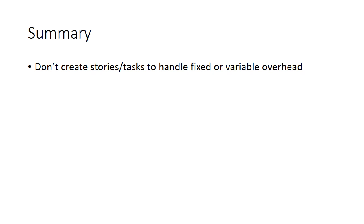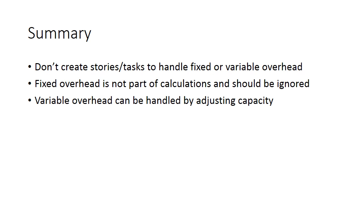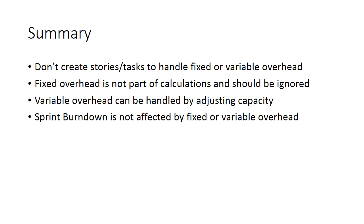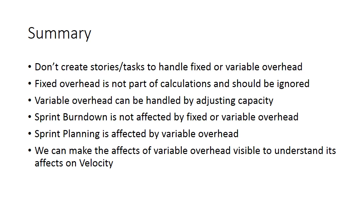To sum this up: don't create stories or tasks to handle fixed or variable overhead. Fixed overhead is not an ongoing part of calculations and can largely be ignored. When you have variable overhead, adjust your capacity to properly adjust the velocity. The sprint burndown is not affected by fixed or variable overhead. Sprint planning is only affected by variable overhead, and we can use capacity to make those adjustments. We can also make the effects of variable overhead visible with an appropriately designed chart. I'm Jim Brisson. Thanks for watching.